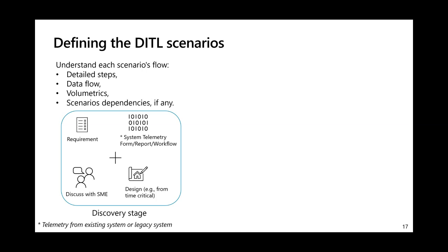The last one should be the design. You can check the design document and also any time-critical process in the design. For example, some job needs to meet the deadline daily, and you can check what part in the design should be the top priority in the application development. Then it should be the key process and should be considered for inclusion in the day-in-the-life testing.